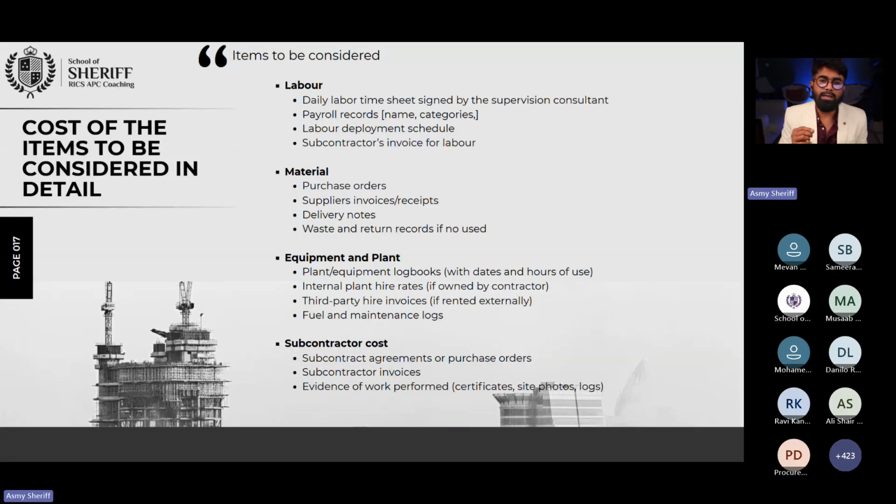Then we started to speak and we said, okay contractor, no problem. Don't worry, we will pay you the money, but submit your timesheet, also your tax invoice. What did we say? Your tax invoice. The meaning of that, a backdated tax invoice from the day that you paid them. You should have released the tax invoices. Without that, you can't claim any money. That's a government work or your work. You should have paid some kind of zakat or tax to the government. So please show that to us.